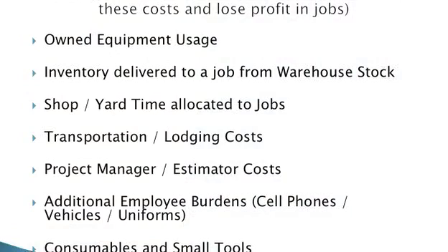Okay, and it was just that. Owned equipment, inventory, he had both, okay? He was not charging anything to his jobs for the owned equipment. He was not charging anything that was in the inventory because after all, it was shelves full of cash that anybody could have, right? Inventory tracking, equipment usage, two of the main points that I've been working on with a lot of contractors over the last couple of years. If you own the equipment, there is always an equipment expense. There's fuel, there's licenses, there's maintenance, right? Depreciation, all of these expenses that go into equipment. In the past, it was free, right? You can just use it. Just use the backhoe for the next 6 months.